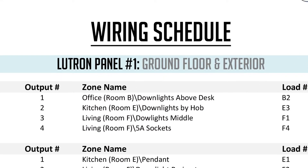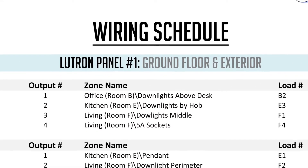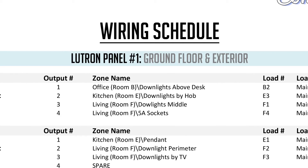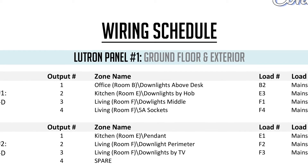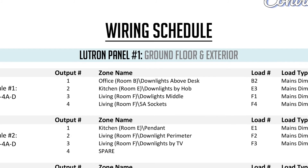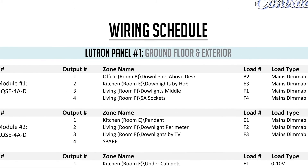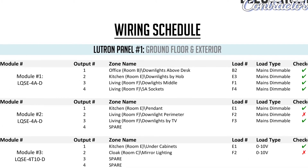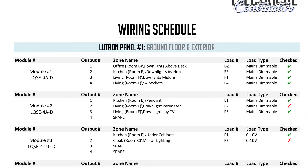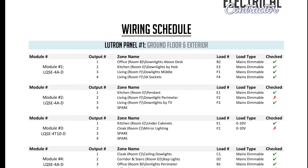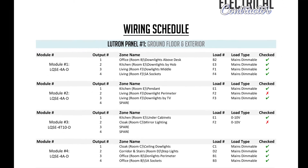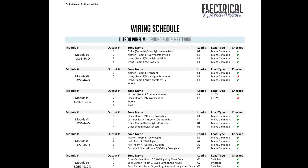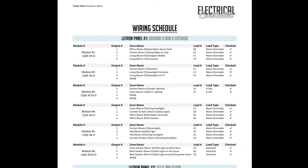The wiring schedule is generally provided by the person who has designed the Lutron system we are about to commission. That wiring schedule will then be supplied to the electrical contractor, for example, for them to complete the wiring of the Lutron panel. So this document already exists — we're not asking somebody to do extra work for us. That's why it should be easy to get as long as we ask for it.